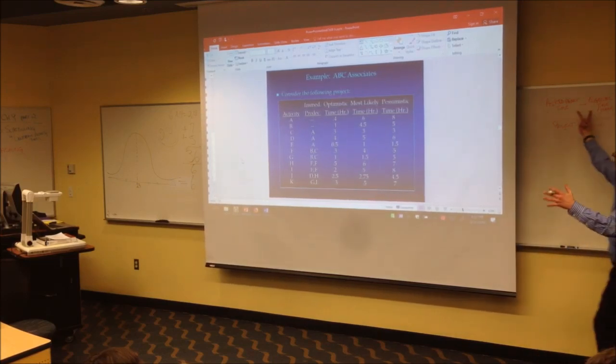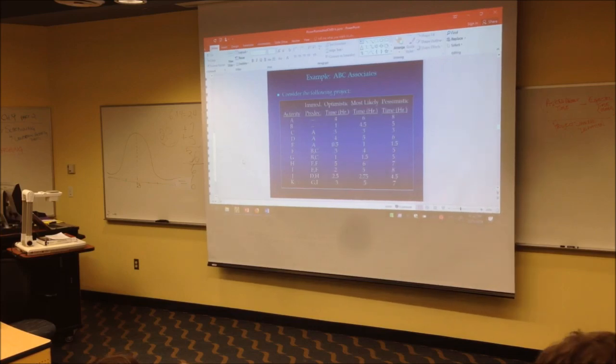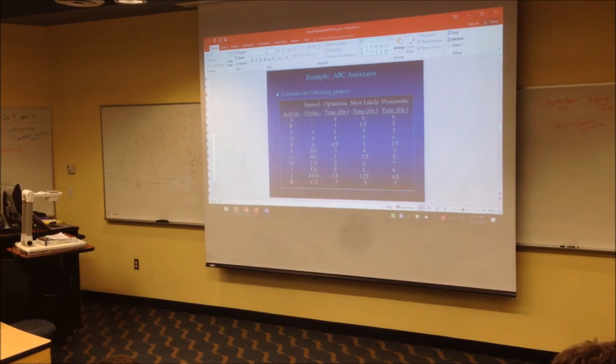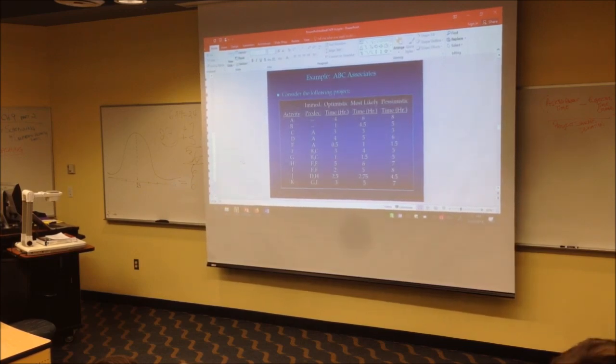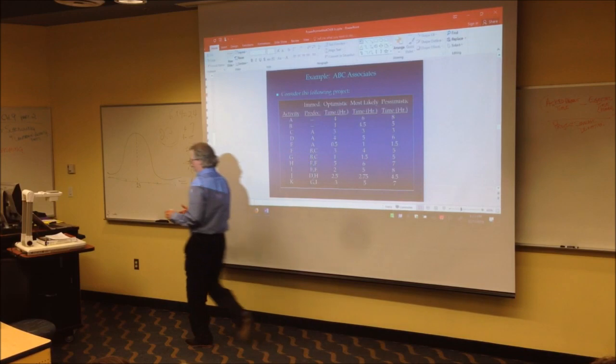If you accidentally turn these around and then look this up, you aren't looking up or less, you're accidentally looking up or more. Instead, stick to this, and everybody should be heading to the right answer. The only catch is, once you find this probability on that chart, if the question says or more, it's the opposite. So if this is 40%, the or more would be 60%. If this is 30%, the or more would be 70%. It's 100% minus whatever this turns out to be if the question says or more. It's either going to say or less or more. Got it?